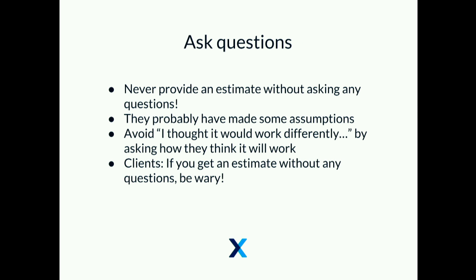Asking questions is critical. Clients will definitely have made some assumptions about how they thought something was going to work, and we've all had the situation where you deliver something and they say, 'That's not how I thought it was going to work.' The best way to avoid that is by asking them how they think it will work. I would strongly advise anyone on the client side: if you ever ask for something and get an estimate back without any questions or clarification, don't trust it. You might have to be the one challenging your vendor to prove they understand what you actually want.